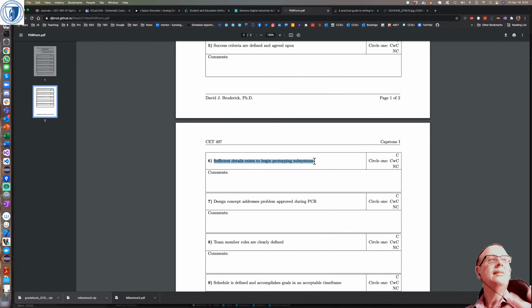If you were doing this in a company, the next step, the prototyping, which is the first half of 498, that's when you start spending money, right? At the moment, mostly it's been research and talking and writing stuff down. But as soon as you hit the button on doing the prototyping, you've got to buy kit.